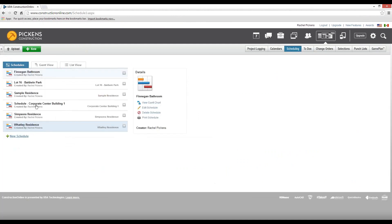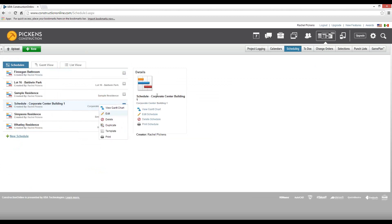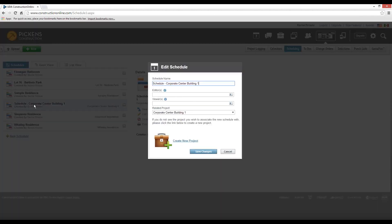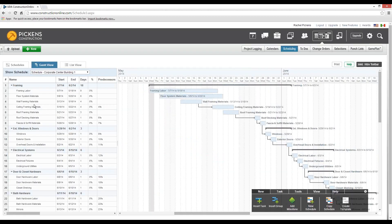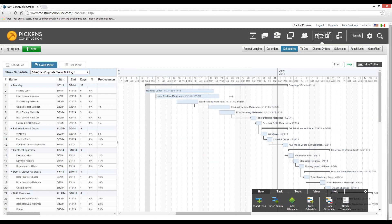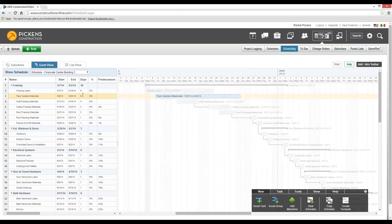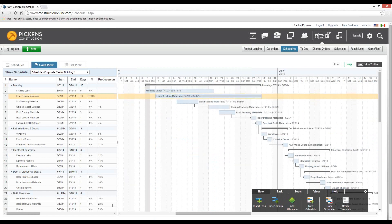With schedules, you'll want to manage permissions separately. If I want to give somebody else the ability to edit or view this schedule, I can use this drop-down menu and select Edit to determine other editors or viewers of this particular schedule file. If we click on the schedule itself, notice that the same Gantt view will appear as it does in our Construction Suite program. Now I can go and make changes, update durations, statuses, set percentages complete — anything as far as updating my schedule within the Construction Online system.